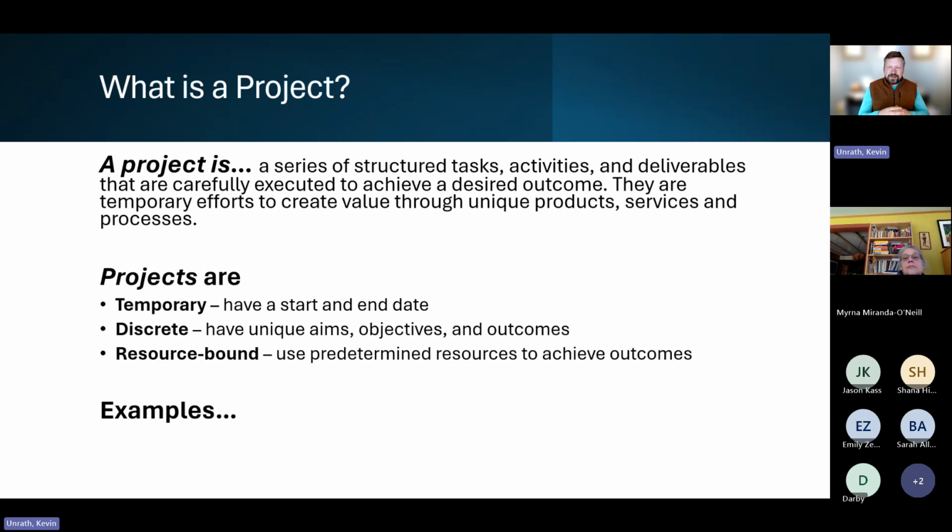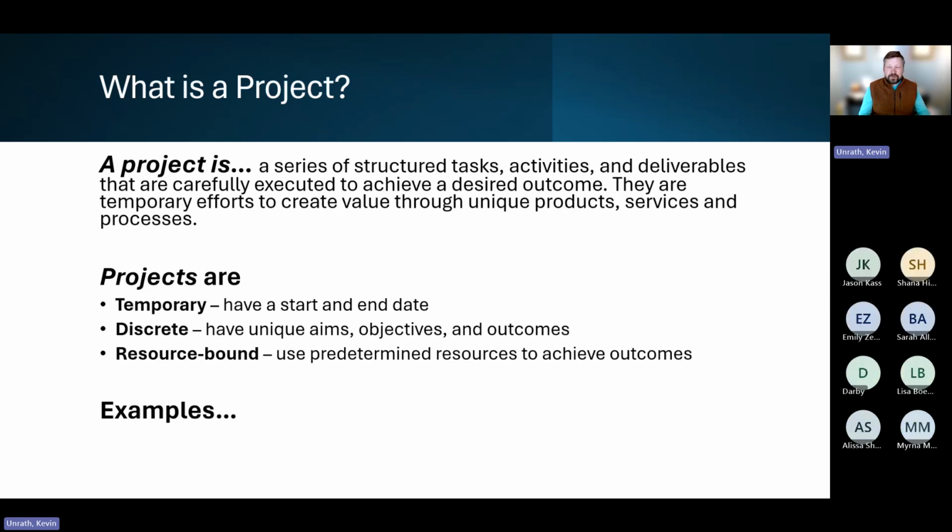I think the easiest way to think about that is to think about the difference between a capital budget and an operating budget. Every year, libraries typically have an operating budget through which they operate. And then some years, libraries will have a capital budget that they're working on for a project. You could, of course, be working on a project that is using resources from that operating budget. But if you're doing that, you're most likely not going to be doing some other things that you were using those resources for in that operating budget, whether that's staff or money or time.